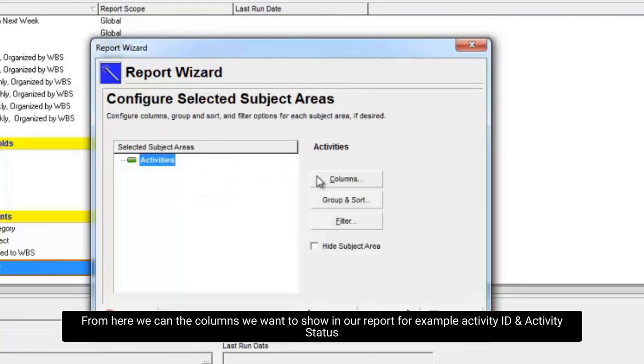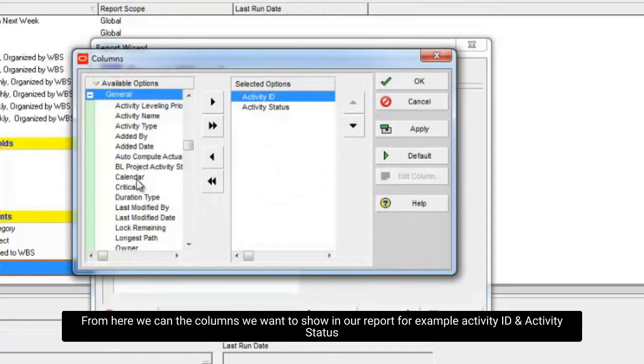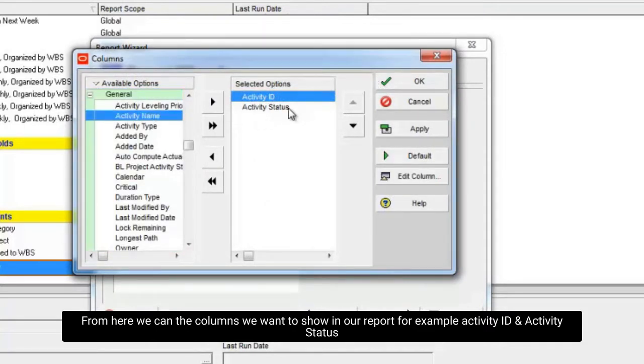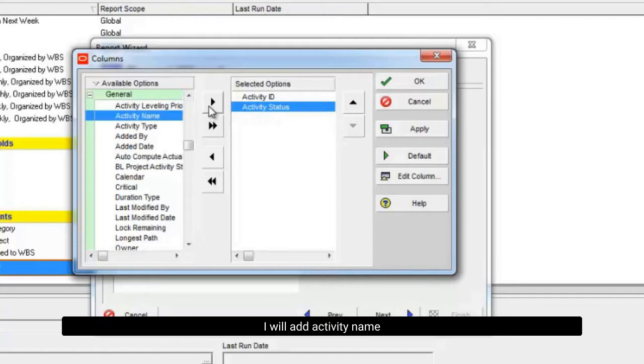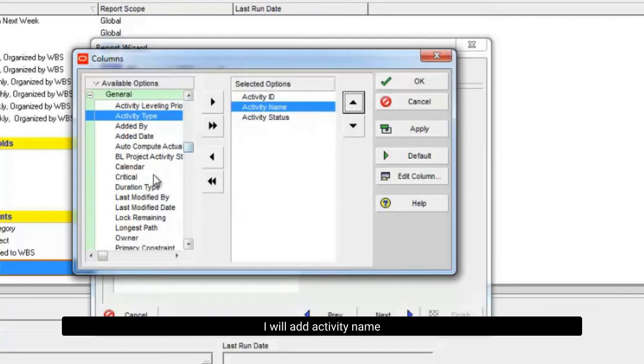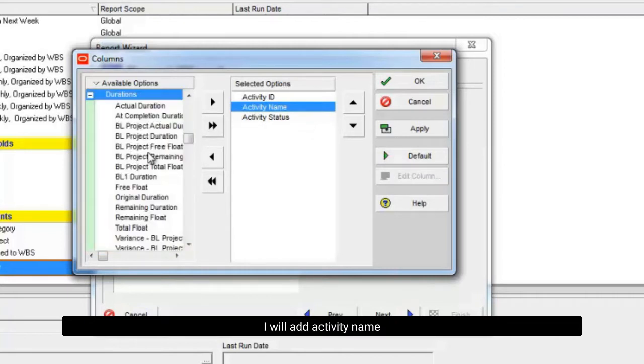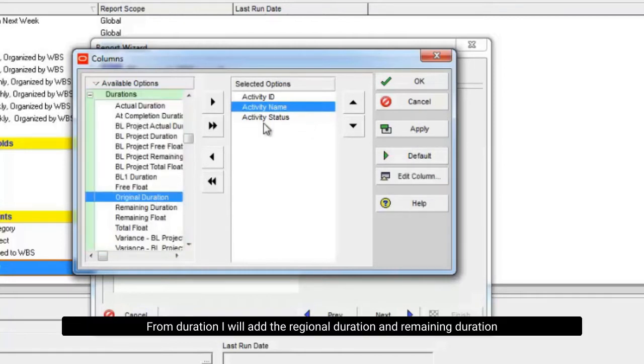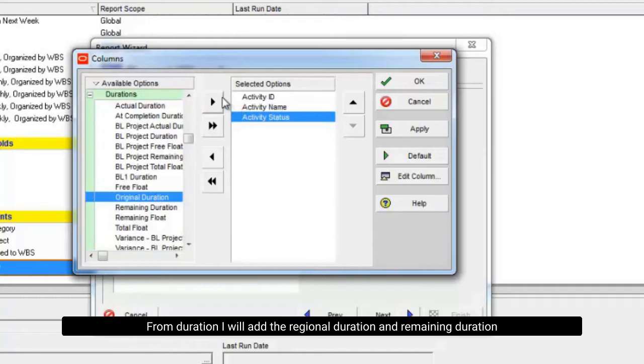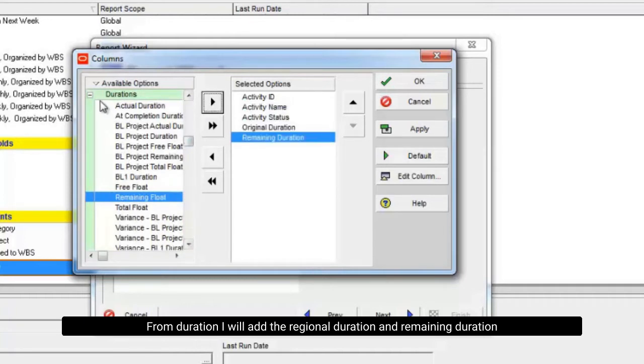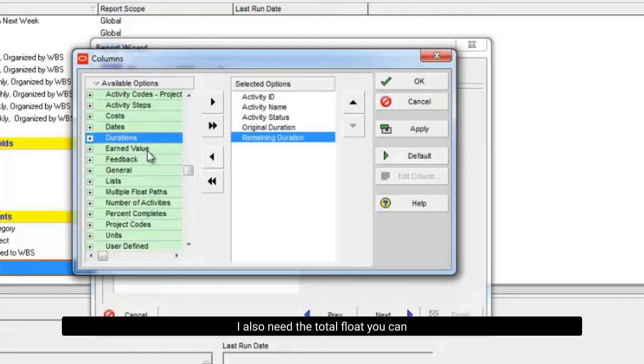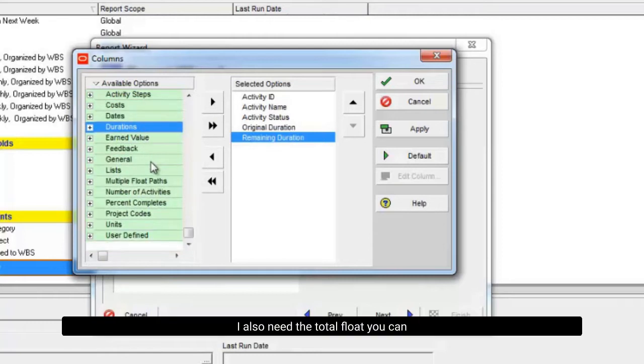From here we can add the columns we want to show in our report, for example activity ID and activity status. I will add activity name. From duration I will add the original duration and remaining duration. I also need the total float.